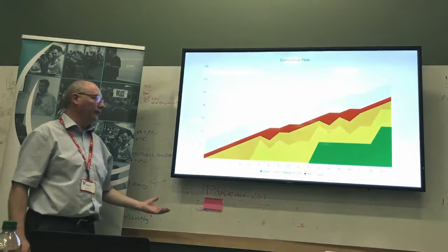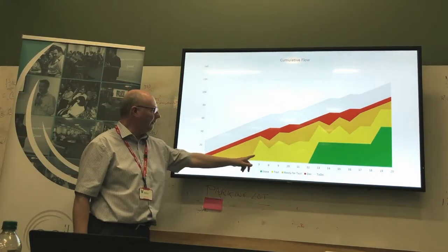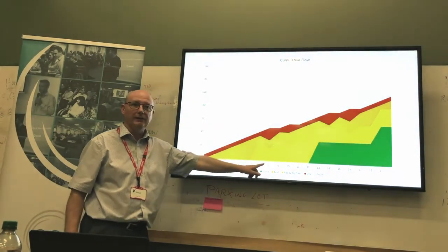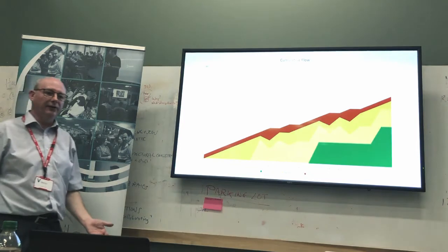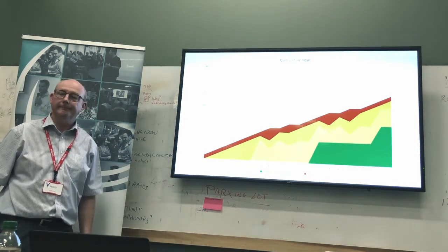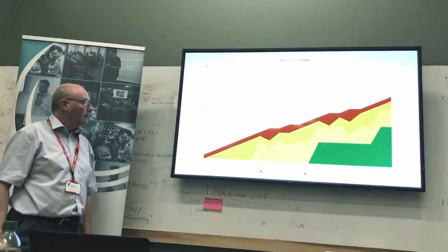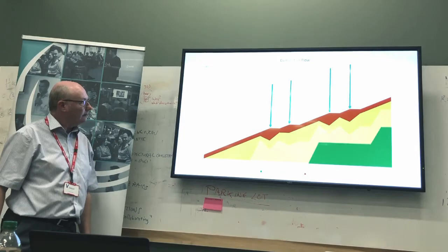This is actually because you're getting slower feedback. You see, you do something here, and you don't find out it's wrong until here, because the development team hasn't got an integration environment to go test it and get some fast feedback in. Yeah, I was just pointing those out.